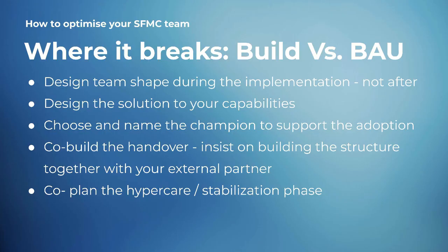Please remember that this handover from the implementation phase to business as usual is not one meeting or a couple of training sessions. It's something that you need to be strategically prepared for in advance. So first, try to shape the idea of your internal team during the implementation. At the solution design phase, during the blueprint, when you know what you are actually building and how it will look, plan it with your partner with the future team shape in mind.